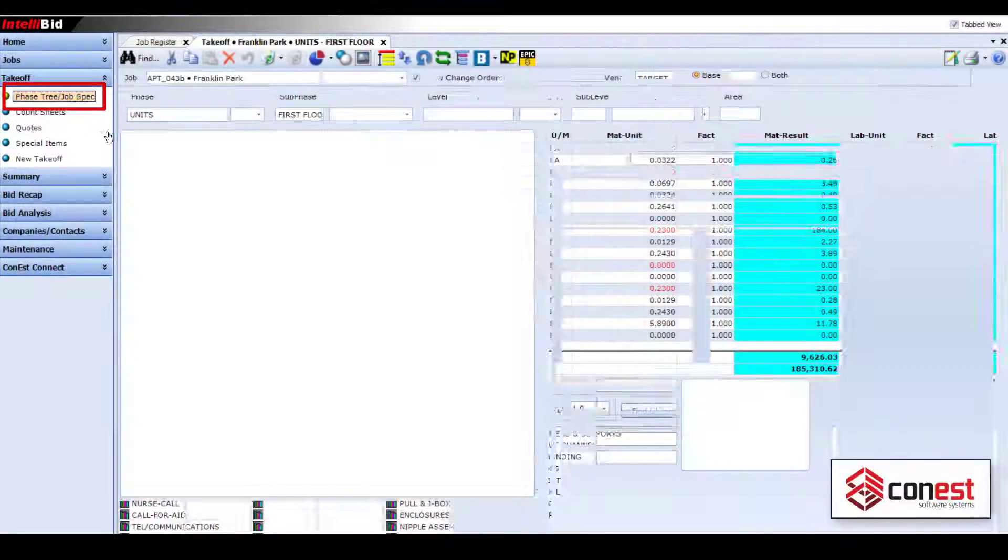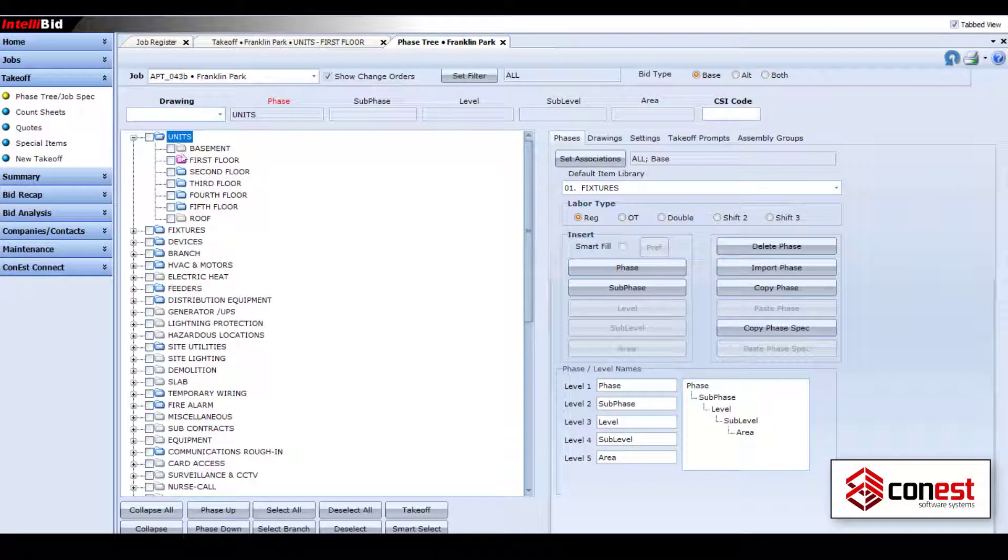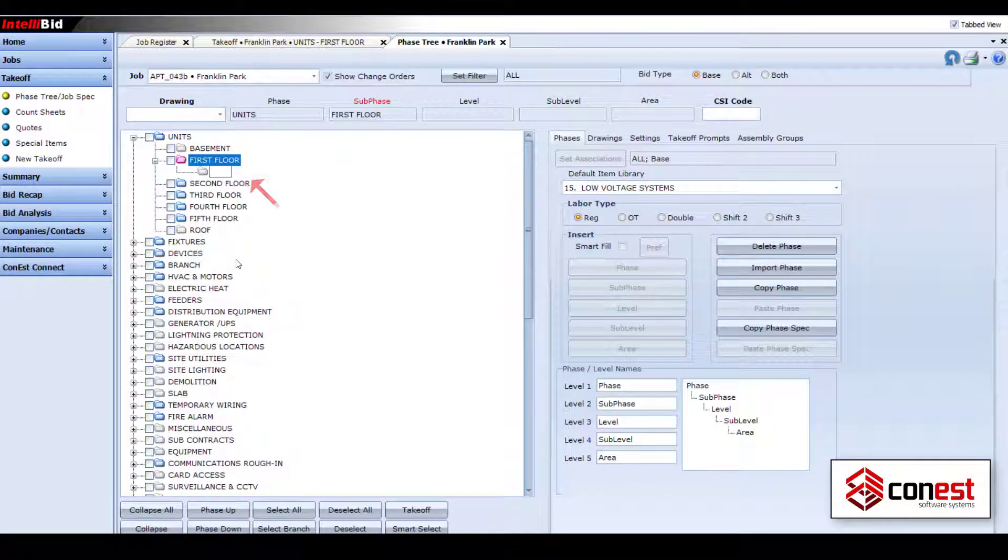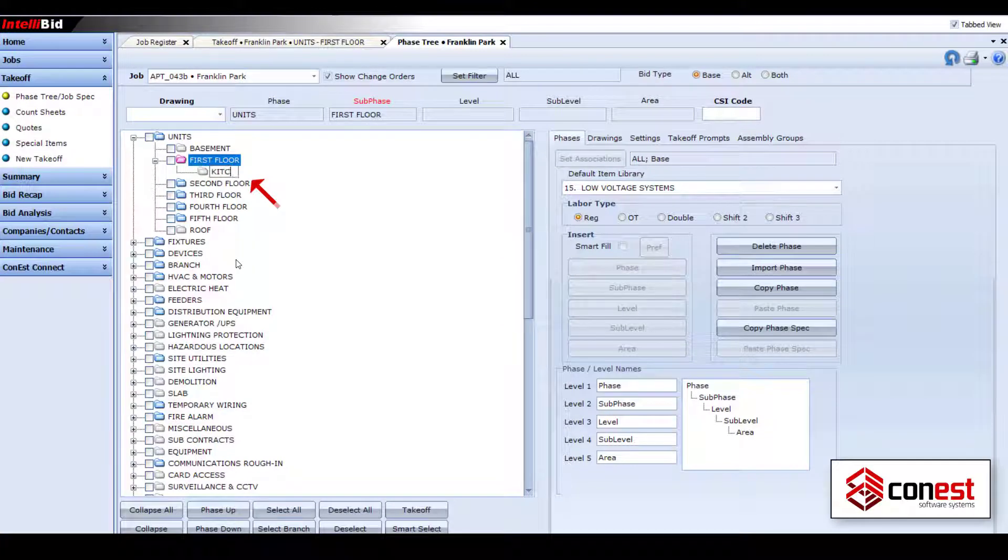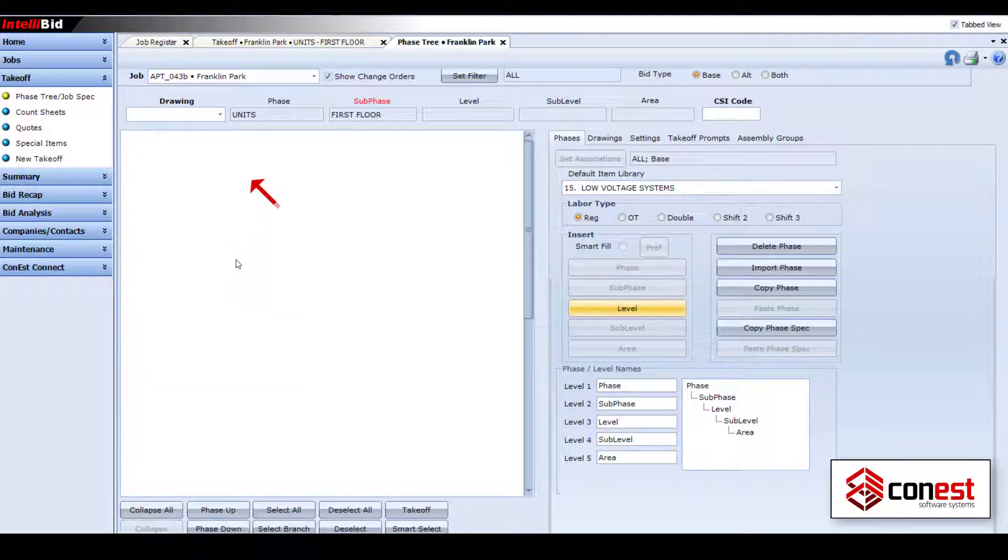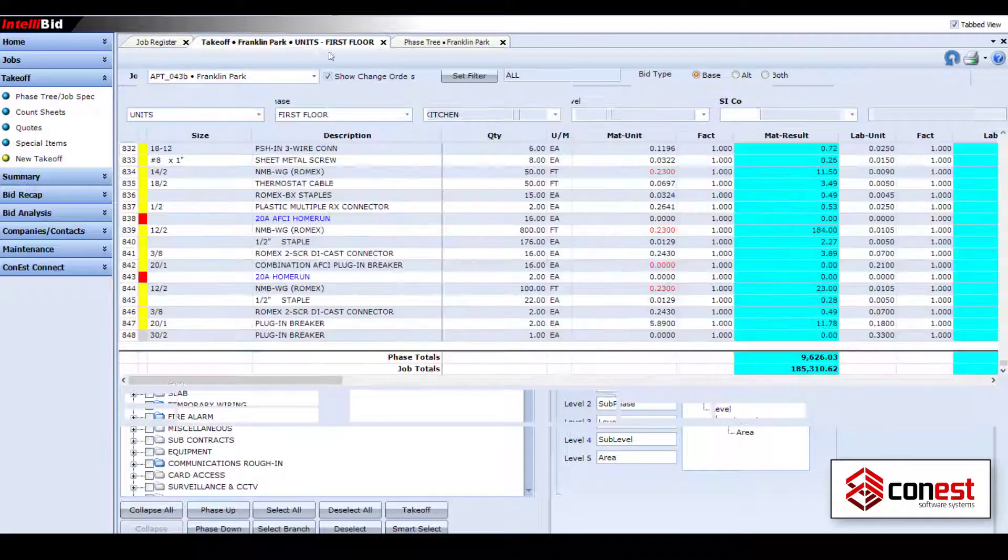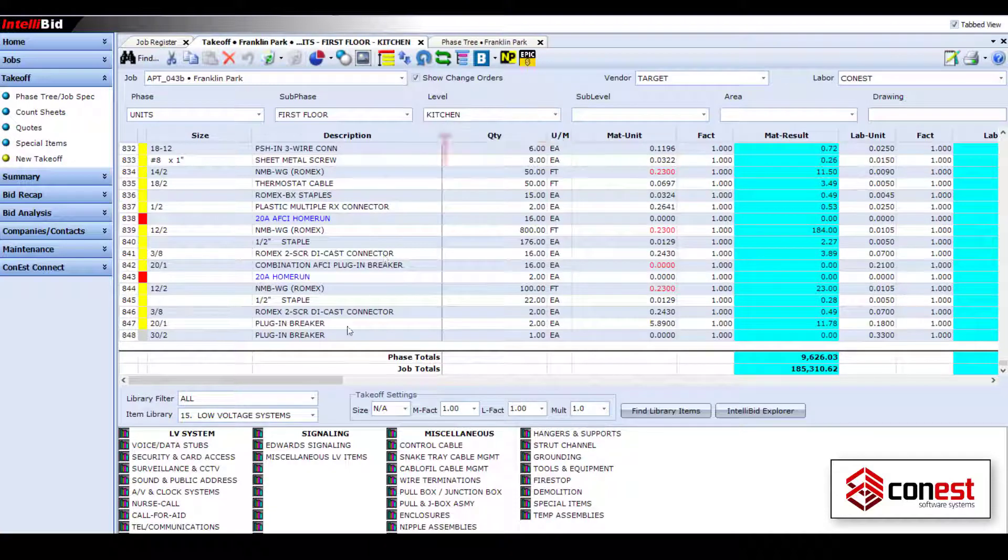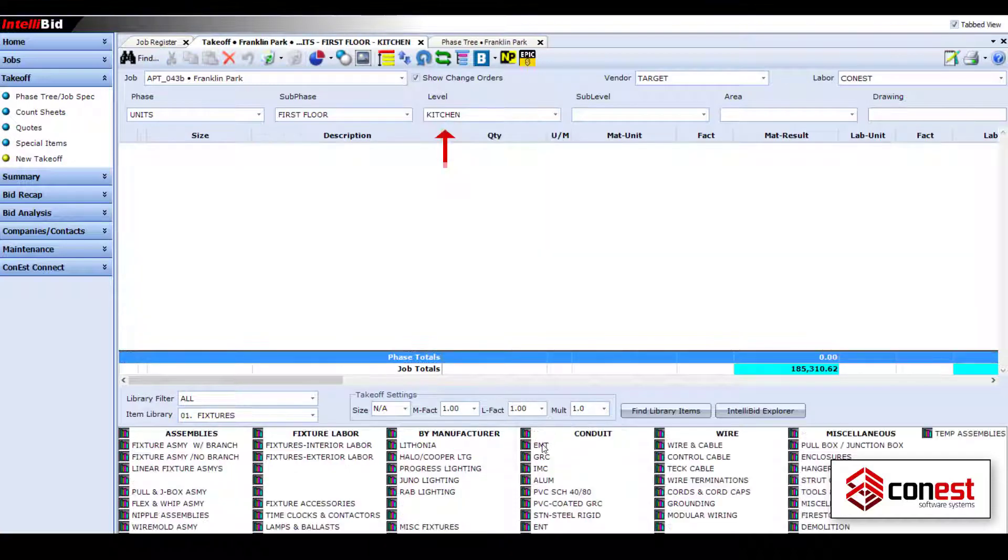Start by using the phase tree in the takeoff area of IntelliBid to break your job down into phases. You can further break your job down into sub-phases, levels, sublevels, and even areas.